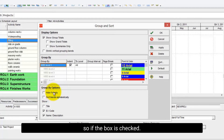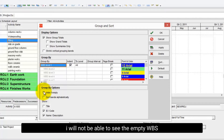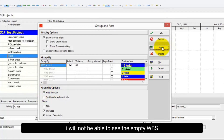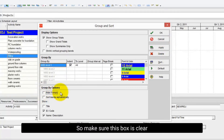So if the box is checked, I will not be able to see the empty WBS. So make sure this box is clear.